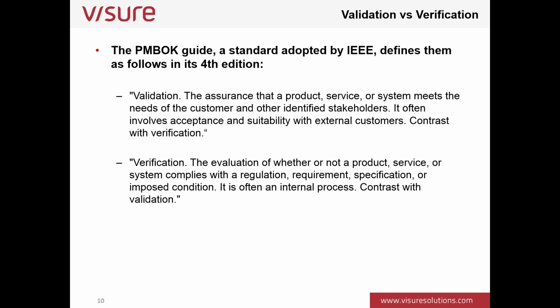Contrast with verification. Verification, on the other hand, is the evaluation of whether or not a product, service, or system complies with a regulation, requirement, specification, or imposed condition. It is often an internal process and contrasts with validation. Basically, verification is checking that the system we have developed matches the specification, the requirements, the regulations.